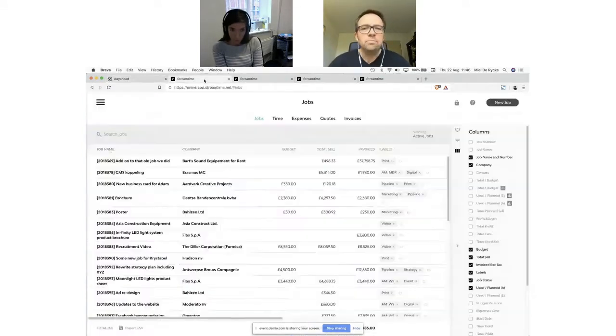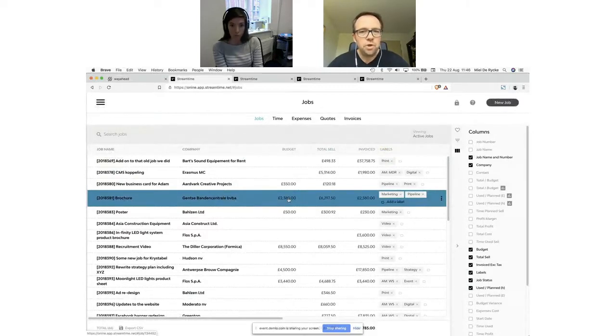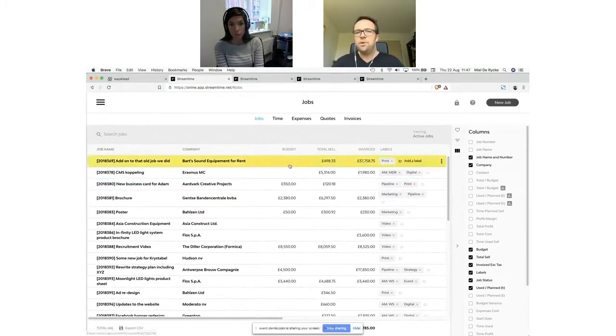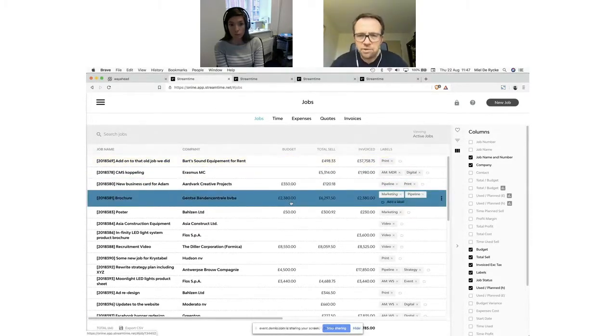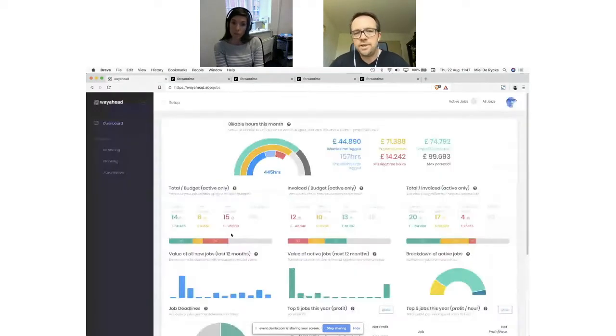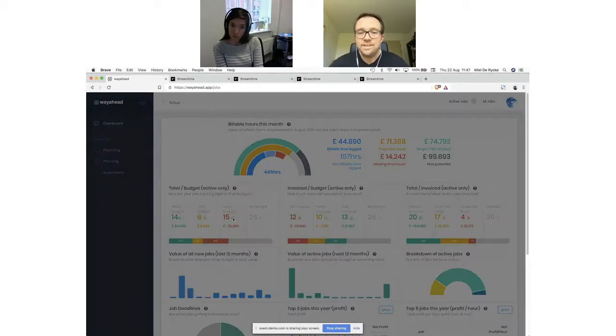That's something you've got in Streamtime. In Streamtime, you know what the budget is on your jobs, you know what the sell value is of the work you've put in so far, your time and your expenses, and you know what you've invoiced. In any studio, that's quite an important measure and comparison. The only thing is, if I want to know if I overspent against the budget, I need to read this number, 6,000, and compare it to that number, 2,000. I don't know that unless I read and interpret the numbers. So in here, I take all that information and calculate those comparisons for you. You can see we've got 14 jobs within budget and 15 jobs over budget. If I want to know which jobs those are, I can click and see them in a little modal.